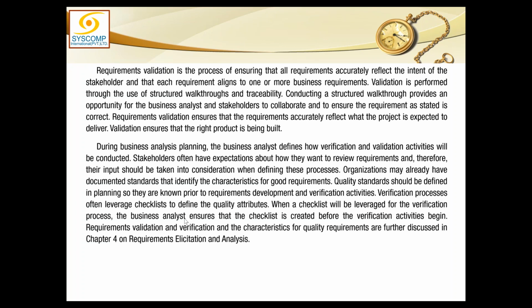Verification processes often leverage checklists to define the quality attributes. You remember, in quality control, we always have checklists. When a checklist will be leveraged for the verification process, the business analyst ensures that the checklist is created before the verification activities begin. So it should be done in planning. Requirement validation and verification and the characteristics of quality requirements are further discussed in chapter 4, in the requirements elicitation and analysis.